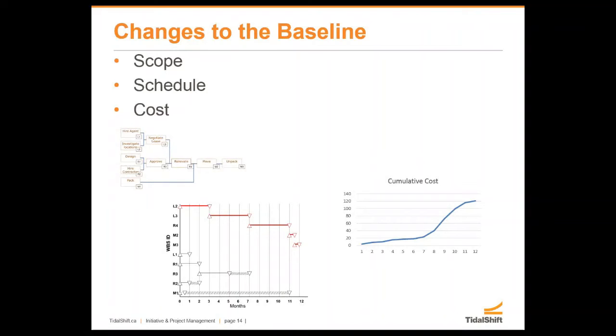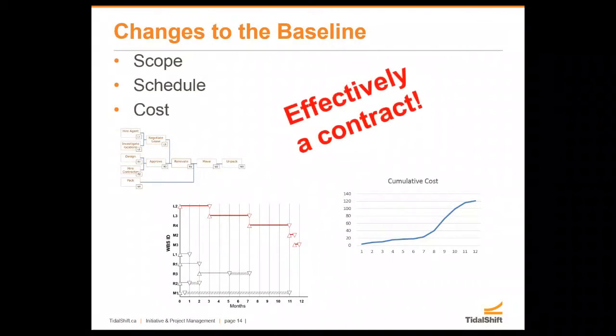When we think in terms of that, especially if I focus on the project or plan side, what we effectively have is a contract. We've contracted with our sponsor and our major stakeholders that we're going to deliver X within a given time period and within a given cost. So when there are changes to that, we need to make sure those changes are well managed, and hence the process is really going to help with that. This is, I think, one of the biggest areas where process is very effective: change control, project change control, or change requests. So, dealing with that. Okay.